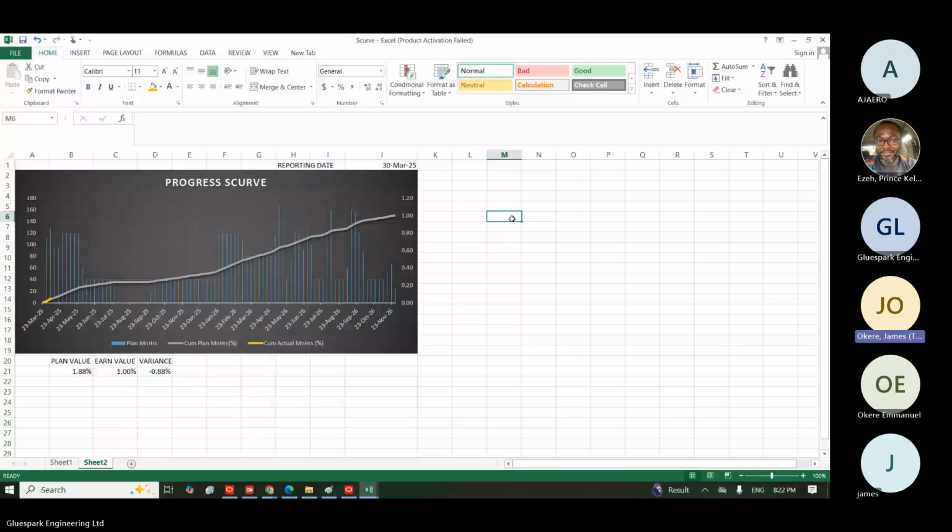So now, in construction, they don't use PSSR. They will just use what we call commissioning and testing. So during their testing process, what they do is check all those appliances you have connected to make sure they are working fine before they test the entire system. You understand? Yes. That's the meaning.